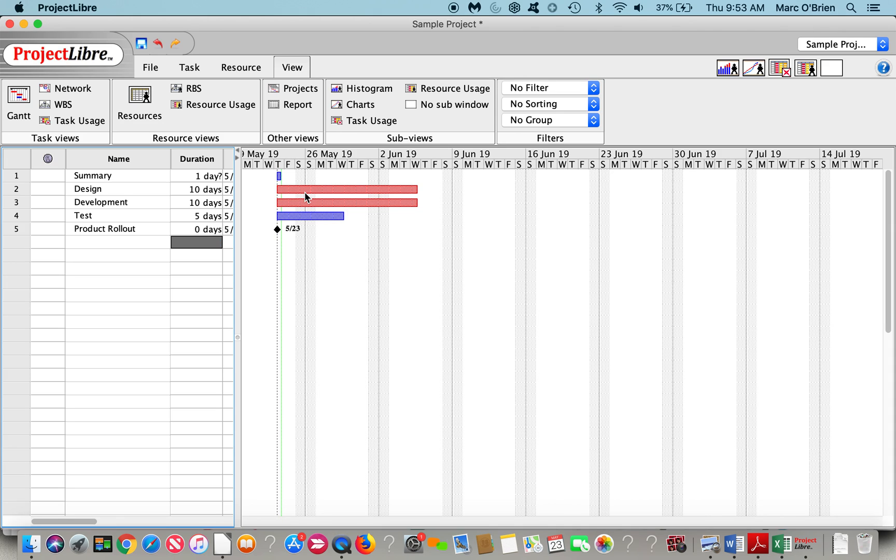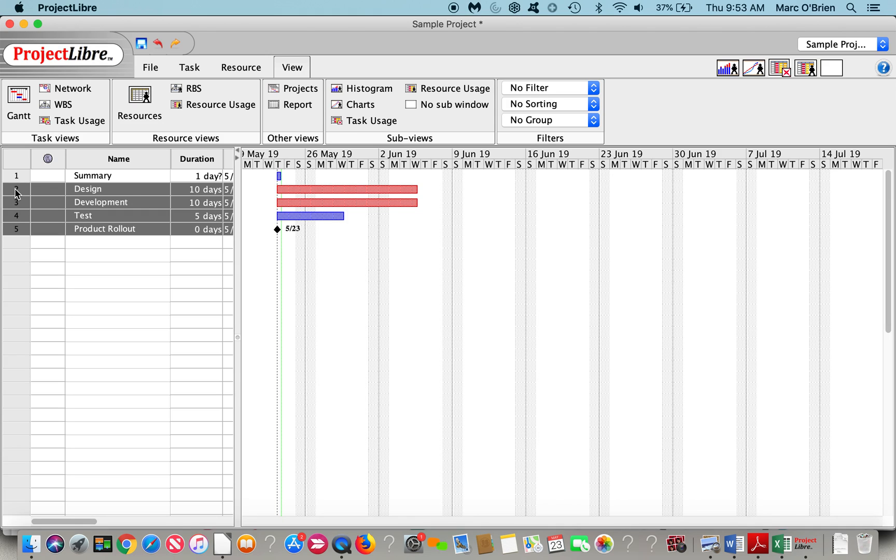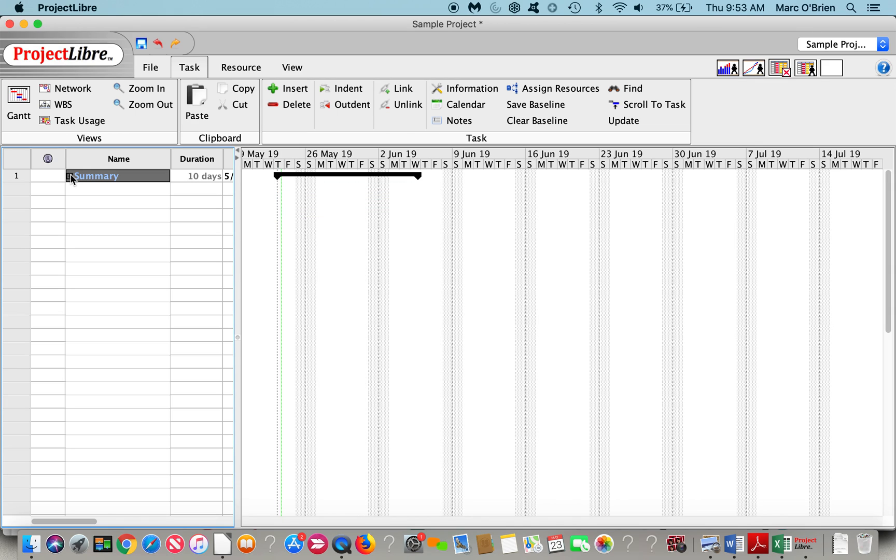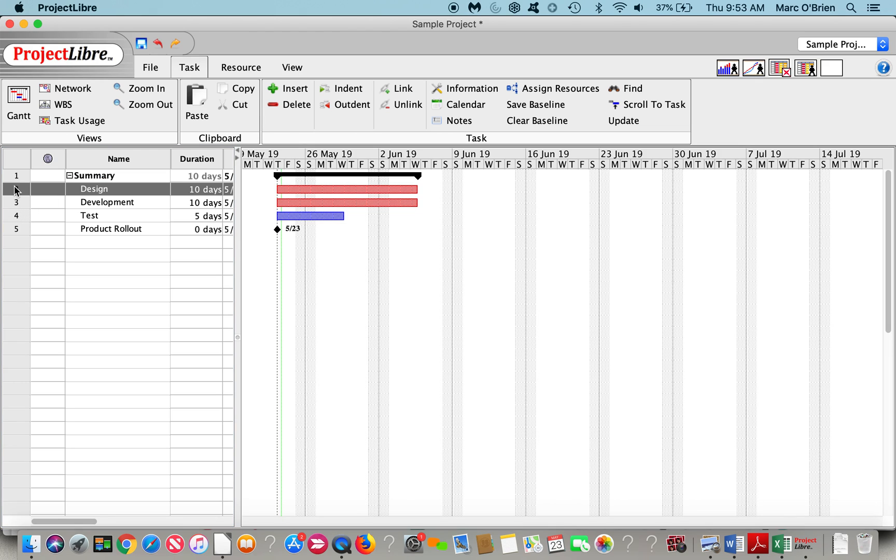Now that I've got the tasks in there, I can highlight these. And if I click on task, I can indent these. We've now created a summary task. That summary task can be collapsed. So if you've got different segments of your project, it's a good way to do that.